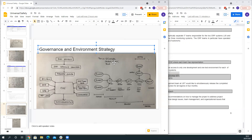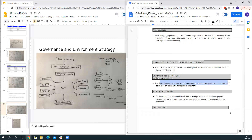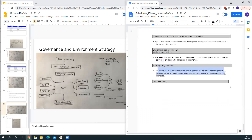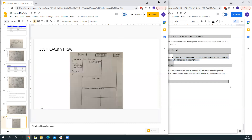Tools used: Git for source control, VS Code as IDE, Jenkins for orchestration, Provar for automation testing, and Jira for incident management. The sales management team would like to simultaneously release the completed solution to all regions in four months. The mitigation is to define an MVP given the aggressive timescales, targeting a big bang release across all regions. Recommendations on managing technical design issues include using the COE to ensure all teams are represented and can reach consolidated decisions, meeting daily or every few days given the short project timeframe.